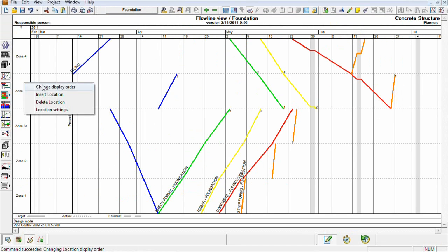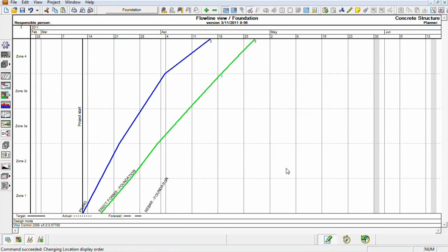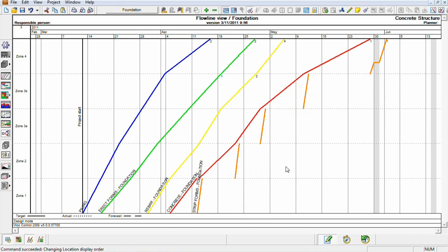And we also maybe, let's show a quick change of the schedule. I want to now match all of my tasks to be the same order that I've defined, and it's just a couple of clicks. No more is it remove logic, remove all of the dependencies, reorder all of the bars on the Gantt chart, add new dependencies between them, reschedule the project, look at all of your filters and try and manage that data. It's just as simple as reordering the locations, and we can copy that order to some of the tasks, all of the tasks.